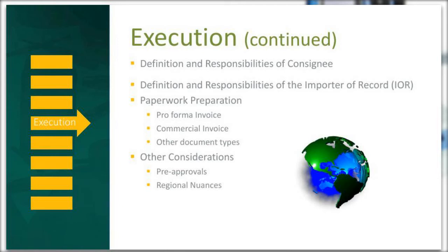Commodity description of the goods, the harmonized tariff number assigned for each of the commodities for your ancillary supply goods, the declared value of the goods, and please note that the proper value for declared value is the value that one paid to have the goods manufactured, or the amount that a manufacturer invoiced the client to manufacture the goods. Also included would be the unit price of each good combined with its total price.